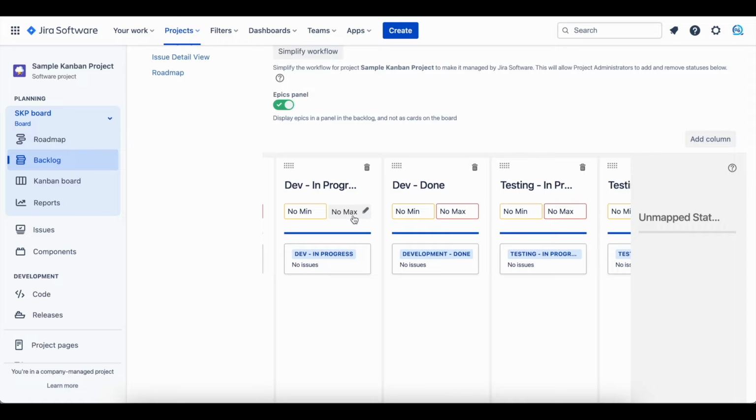What I noticed over the years is that for this low WIP limit to work well, you need to have a mature Agile team and low impediments in general. If this sounds like your team, this WIP limit would work well for you. If your team has a good amount of impediments and is a new team or not as experienced, I would start with a 6 WIP limit per each development column. This might be high at first, but you can start there for a couple weeks and monitor the team's flow on the board, and with time you can slowly decrease the WIP limit and find your optimal WIP limit. For our example here, we will assume we have a high-performing team and use 3 WIP limits per development column.